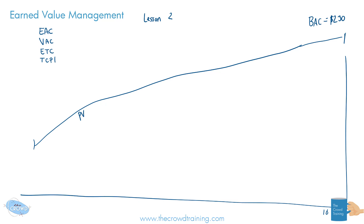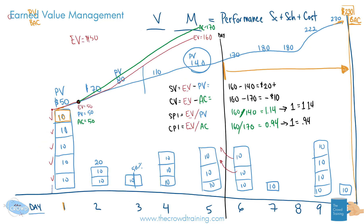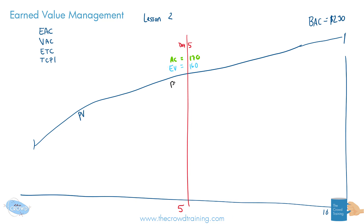Then we also looked at, if at any point in the project, let's say at the end of day five, what can we forecast or predict? Now, recalling some of the numbers we had in the first lesson, we had an actual cost equal to $170 at this point, an earned value of $160, and a planned value of $140. So that's what we're using from day five.